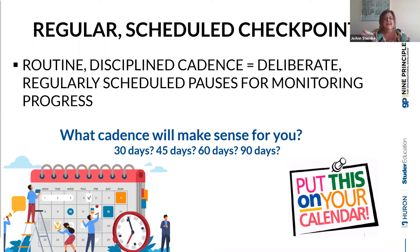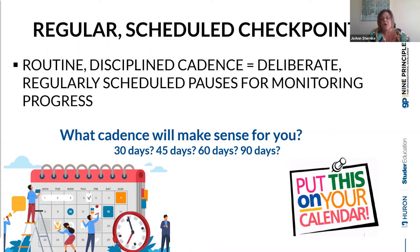When I was a superintendent, I would stoplight our strategic plan — not independently, but coming to the table where every process owner would bring their action plans colored in green, yellow, and red quarterly to show the progress they're making. What I loved about turning the tool into a process was that it increased our accountability. We knew if we had to bring it to the table, we would make sure the work got done. And there was something really wonderful about how graphic it was — it felt good to turn things green.